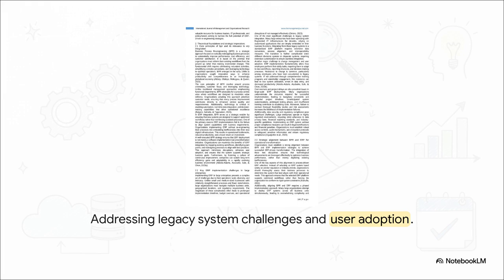Executive leadership must recognize that this migration is a high-risk extraction process. Data must be sanitized, legacy codes must be mapped to modern standards, the organization's technical debt must be paid in full before the new architecture can function effectively.